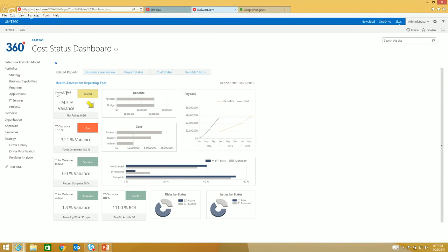In this case, what you can see is yield, which is value over cost, strategic value divided by cost, has actually decreased. It's decreased because value stayed the same, but the cost has increased by 32%. So I'm spending more money to get the same value, therefore yield must degrade. It acts as that investment warning indicator.